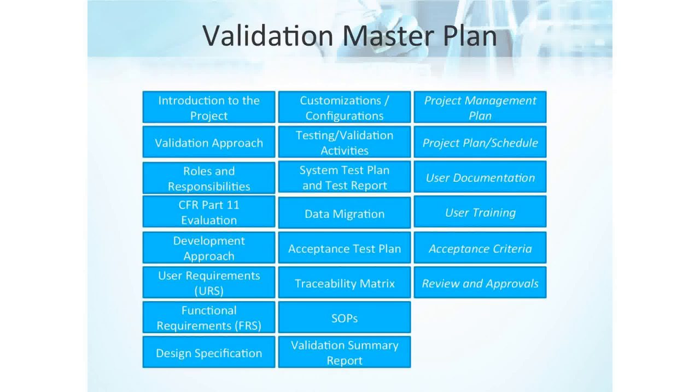Acceptance criteria. How's the project going to be accepted? Because there's different levels, right? There's technical, there's functional, there's user, there's organizational. So you need to know what steps are required, because I think most of us have been in a situation where we've done the technical work, we resolved the issues, and all of a sudden, oh, there are other people who need to approve it, or maybe there's a document, maybe there's some process. That could sideline your schedule. So the good project manager will have gone through and planned out what the organization requires for a system to go live, and actually that feeds into this last one too.